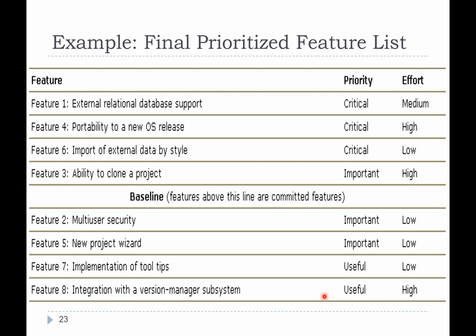A lot of projects do fail because the scope is so high, so you set your plan wrong from the beginning. In other words, had I had that scope very, very high from the beginning, I might have on day one decided to work on feature 8, thinking I have enough time and enough money, when it wasn't really that critical or important. I would have maybe worked on feature 5.